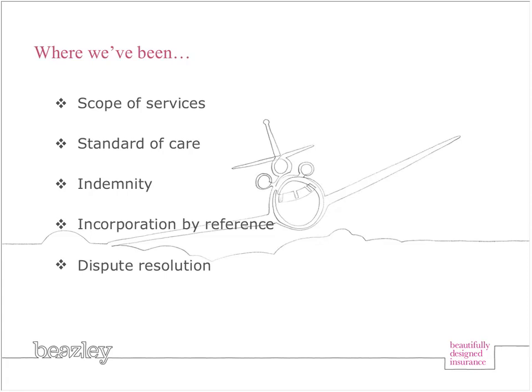So you want to make sure you have a scope of inclusion, meaning you're going to detail and define all of the services that you are going to provide. And then to the extent that you know at the time of contracting, a scope of exclusion, meaning you're going to say excluded services include but are not limited to, and then you're going to list the things that you know you're not going to provide. You don't want to have just a scope of exclusion, because when you think about it, you'd never truly be able to list in the universe all the things you're not going to do. So inclusion, and then to the extent that you know, exclusion.